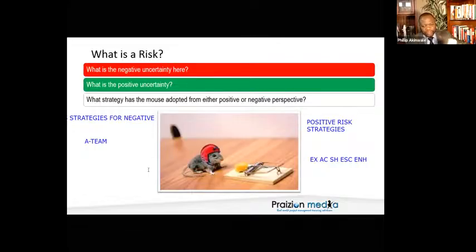Give me an even more precise name for what Phil is doing. I'm not doing anything. Thank you, Maribel. That is correct. It is passive acceptance. That is exactly what it is. Not doing anything to deal with the risk is passive.